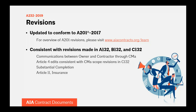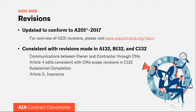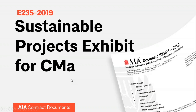We made changes to A232 consistent with the revisions made in the agreements. Communications between the owner and contractors go through the CMA. The Article 4 edits are consistent with the scope revisions Arlen talked about in C132. Some language was edited to clarify how substantial completion is handled, and the Article 11 insurance section was changed as discussed with respect to the exhibit.